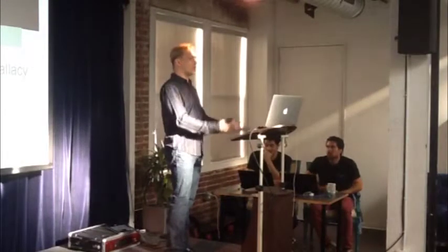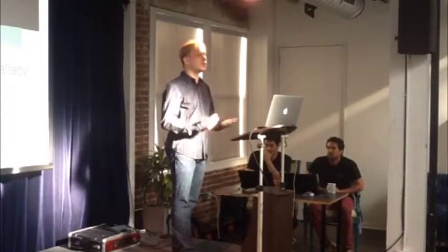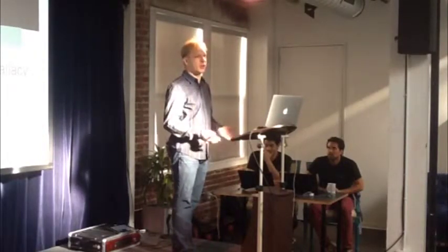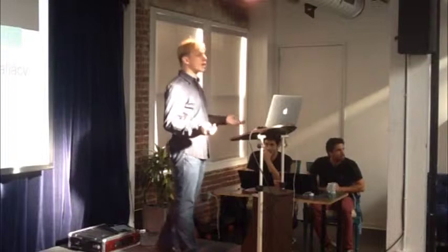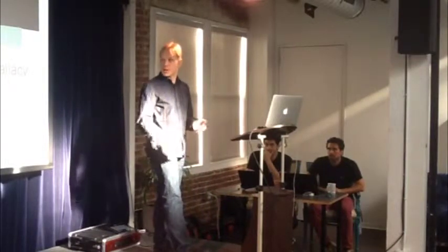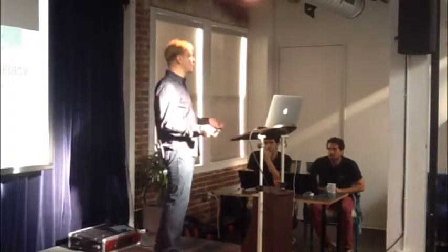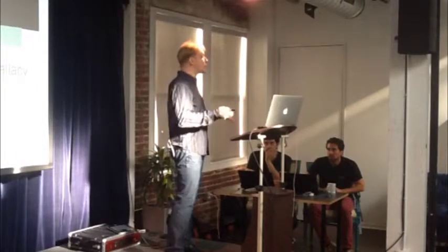You ask the developer, how much time is it going to take to build this? How much is it going to cost? They want to give you an answer that is going to make you smile. That is very hard to fight against when you're trying to come up with an accurate estimate. And it adds to the optimism fallacy, improving the likelihood that the estimate is over-optimistic. And the third one is, let's be honest, there's bid competition. When you are shopping around for developers, you're going to be asking for estimates from every developer, and those people know that they are trying to win your business.